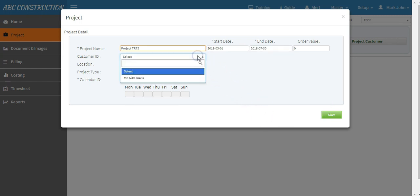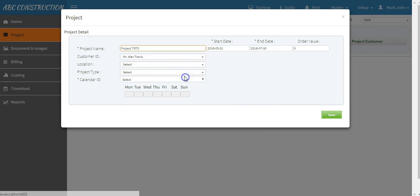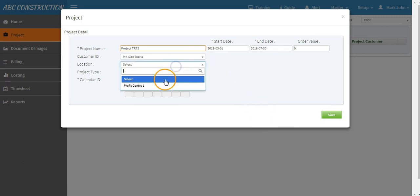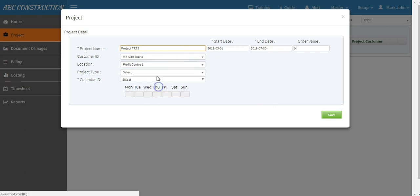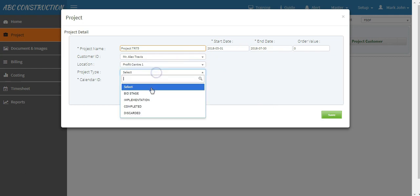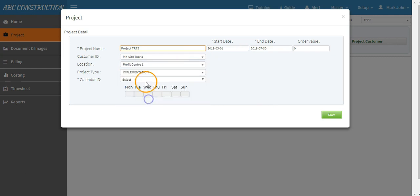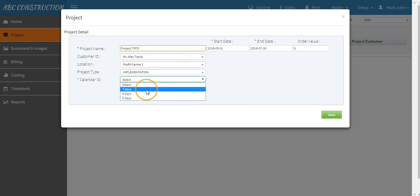Select the customer ID, select location, project type and calendar. Select how many days you will be working on your project. In some projects you might be working for seven days a week, or it might be five or six days.